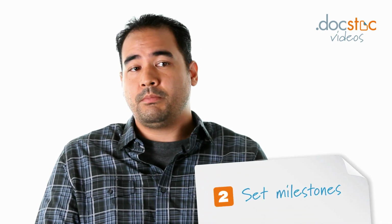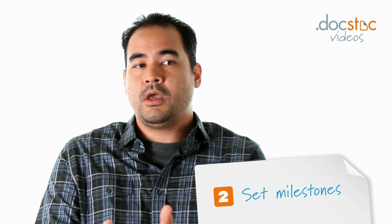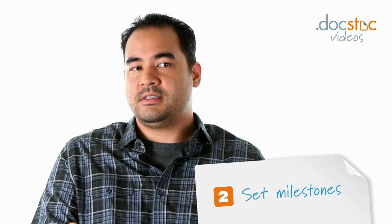Secondly would be to set milestones. So you've set your timeline, but now you need to be able to determine within that timeline when various things need to be accomplished. So for example, if you're working on a project that takes 2 days for design, then for design you would say if the project starts on Monday, by Wednesday design should be completed. That is a milestone that needs to be met, because if it is not met, then you've gone outside of your timeline and you have jeopardized the completion of the project.